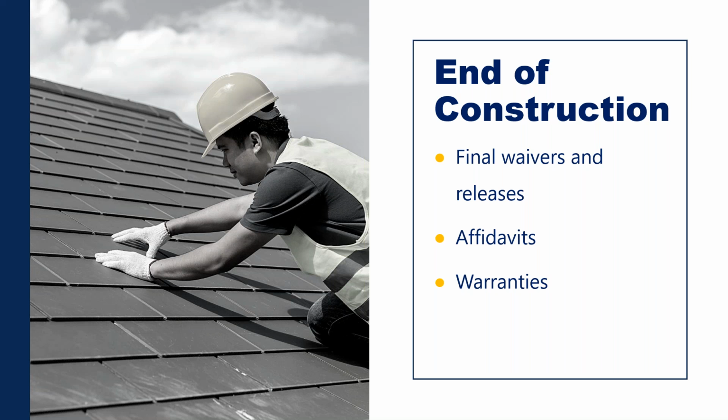So the same analysis that I gave you of partial lien releases applies to final waivers and releases. Be very careful about what you're releasing and what you're not releasing. Are you releasing retainage? Are you releasing outstanding change directives or change orders that you haven't negotiated yet? Affidavits, okay, you may be required to provide a final payment affidavit saying that you paid everybody underneath you. Well, if you didn't pay everybody underneath you and you signed that, you got problems because you just signed a false statement, a sworn statement that's false, okay? And you know, all you got to do is watch the news to figure out what happens there.